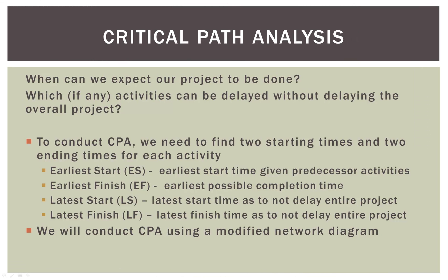So what is critical path analysis? It allows us to answer a few questions. It allows us to see when we can expect our project to be completed, so if everything goes according to plan we will have an anticipated completion date. It also tells us which activities, if any, can be delayed without delaying the overall project. There are certain activities that must be completed on schedule; however, others have what we call slack time — those are activities that can actually be slightly postponed, or we can move resources from them to other activities to make sure those get completed on time.